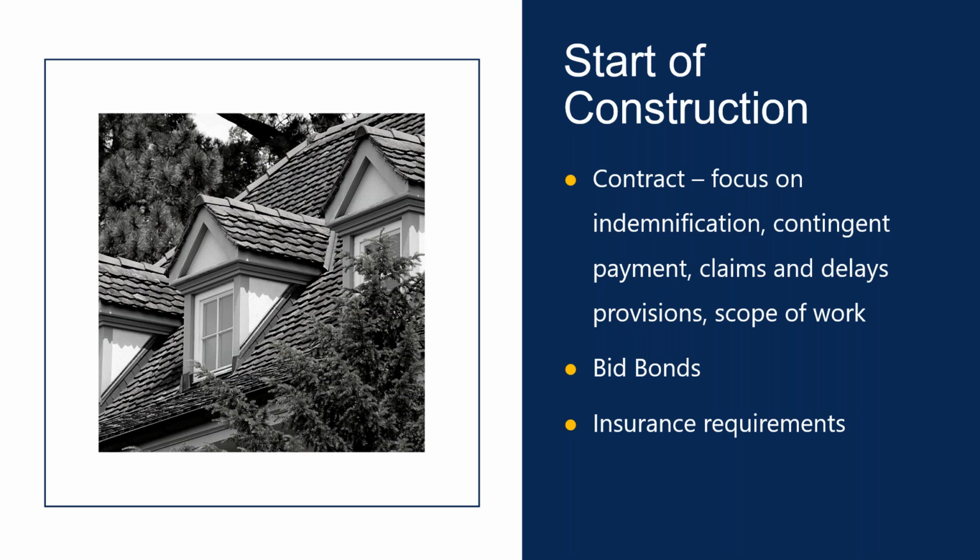Now, what this contractor should have had is time and materials in his contract to cover replacing bad decking, and he didn't. Okay, so that creates a dispute. Pay attention to your scope of work. Talk to people about not only what you're going to do, but what you're not going to do.